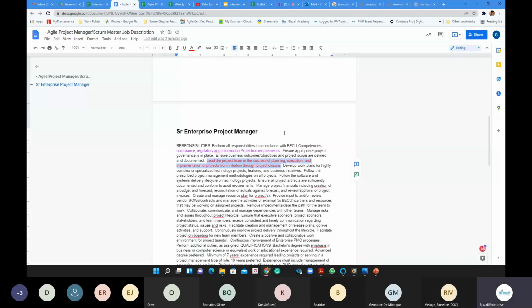Execution. That's why, if you are in agile, and I always suggest that you use agile for the execution, that means you're breaking that into sprints. You have 2-week sprints, you deliver all those things, you break it down into epics. From the epic, you break it down into stories. The story now, the team will take the story and work on it on the 2-week schedule where they deliver an increment. And then the increment is tested, and when the increment is tested now, it is released to the end user, and gradually like that until the project is over.